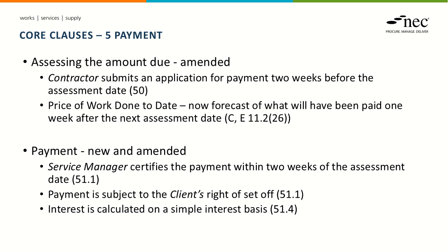The timing of the payment certificate has changed and is now within 2 weeks of the assessment date rather than 1 week, and payment is subject to the client's right of offset. That has been introduced into 51.1, and interest is now calculated on a simple interest basis.